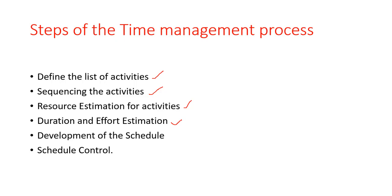The fourth step is duration and effort estimation — determining how much time an activity will take to finish. The fifth step is development of the schedule. To create an accurate schedule, parameters from the previous steps are considered: activity sequence, duration, and the number of resources. If you perform this step manually, you may end up wasting a lot of valuable project planning time, so there are several software packages available for preparing a schedule.